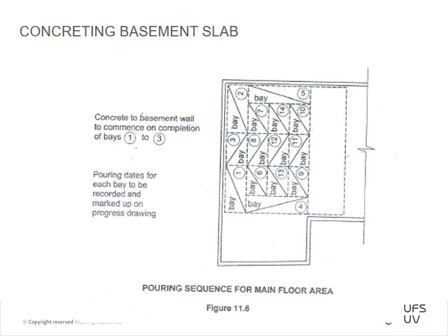Okay, then they went into more detail about construction bays. They've got certain blocks that they do their pours in, because you can't pour a continuous block. Remember that site visit to SARS, where we had the construction joints and the saw cut joints for the expansion or movement of your concrete. That's basically why you have to plan boxing in your concrete pours within the specified parameters from the contract or engineer. Okay.